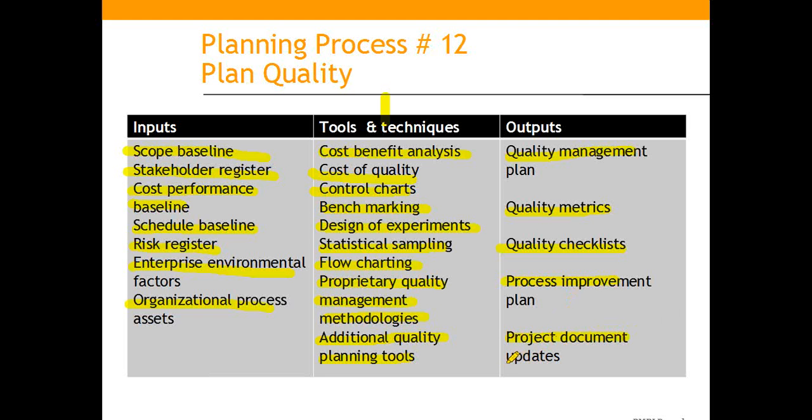And project document updates. When we do quality planning, we may have to go back and update the scope document. We may have to go back and update if it has a major impact on time, cost, and scope, then even a revision of the project's charter may be required at this stage.